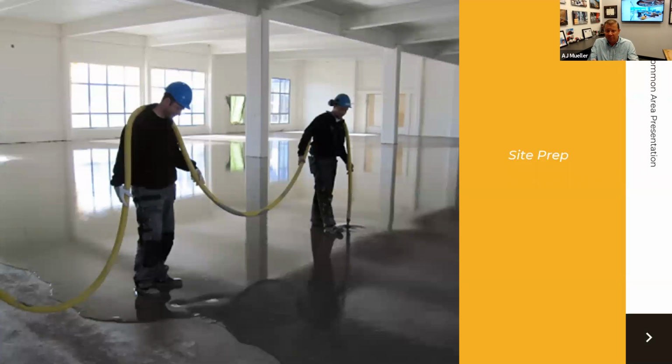So if we have floor leveling that needs to be done because there's a 1/4 inch tolerance over 10 feet for a system that's prefabricated. And also one of the biggest things, not only the cost associated with floor leveling: in the perfect world, you would finish something like this where you float out a space, then you take your measurements and send it to the factory for them to start production. Once you mark up your shop drawings on a product, our schedules and timelines don't allow for that. When you're working in an interior office market, the timelines are way too fast tracked compared to what that process takes. If you lay it out on paper, the glass will be coming a month or two after the tenant moves in, which is unacceptable.